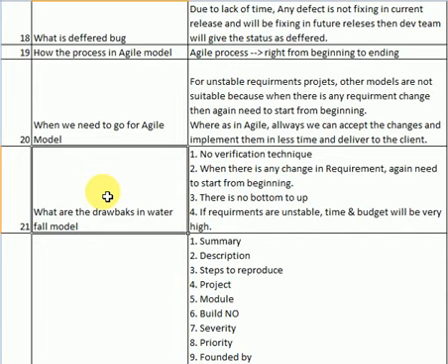Because of that, so much time is going to be taken when our requirement changes, because you need to follow all the phases from top to bottom. So that is the main drawback in the waterfall model. So what type of projects is it suitable for? It is suitable for projects whose requirements never change.